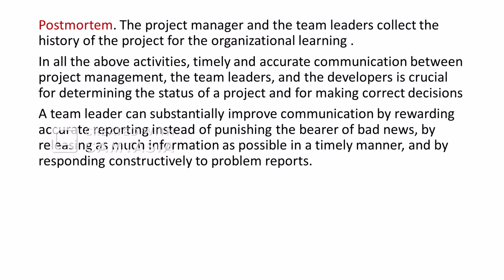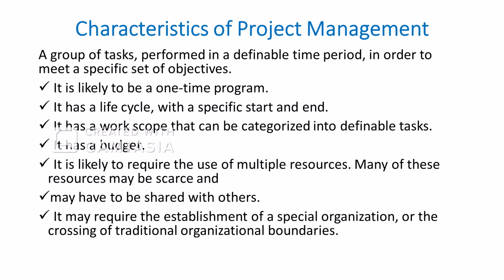A team leader can substantially improve communications by rewarding accurate reporting instead of punishing the bearer of bad news, by releasing as much information as possible in a timely manner, and by responding constructively to problem reports. Saying this, we have to see the characteristics of project management.